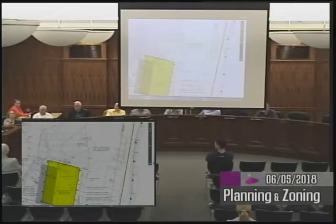I was going to say, too, as part of the building permit application, the structure has to be designed to meet state building code for wind loads, snow loads, and other live and dead loads. So it does go through that whole process like a typical building would, because it will require a review and permitting through the building department in town. Okay, and does the manufacturer have an estimated useful life for this? They say more than 20 years. So 25 plus years. 30 years, yeah. They've seen them last that long, as long as you use it, you inspect it, and you don't have any type of tornado go through where debris may impact it. We shouldn't have the problems. Thank you very much.